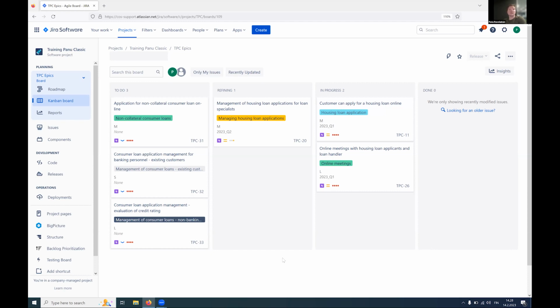When we are looking at the epics, we mentioned that these typically take from 1 month up to implement. Maybe following up the epic board makes sense roughly every month, so that we have an idea of what's really going on there, and we can see the progress and see what we are currently working on, what we need to start refining and defining so that we can start working on it as soon as we have capacity for it.